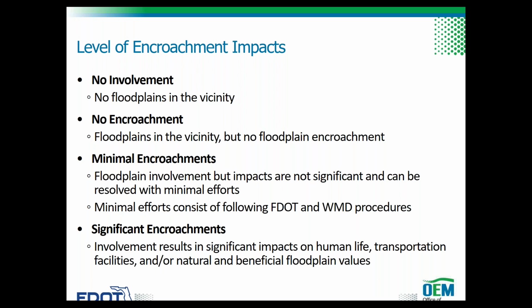Minimal encroachments on a floodplain occur when there is floodplain involvement, but the impacts on human life, transportation facilities, natural and beneficial floodplain values are not significant and can be resolved with minimal effects. Normally, these minimal efforts to address the impacts consist of applying FDOT's drainage design standards and following water management district procedures to achieve results that will not increase or significantly change floodplain elevations or limits.